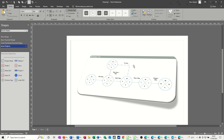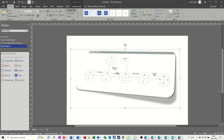On the screen you can see a photograph of what I'm going to recreate in Visio. In these types of diagrams, you have an event, then an activity, then an event and an activity. These numbers — the 10s, 20s, 30s and 40s — are just event numbers. What you've got here is the earliest event time, then the latest event time, and then this zero is the float which becomes the critical path. If the float is zero, that is the critical path.